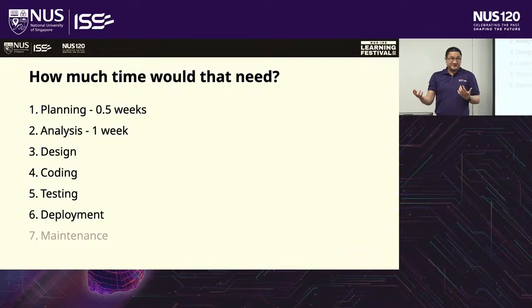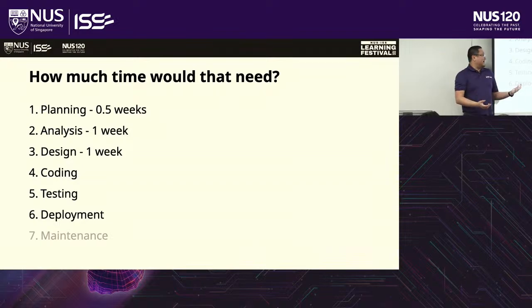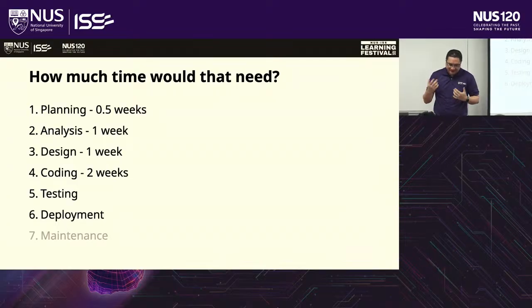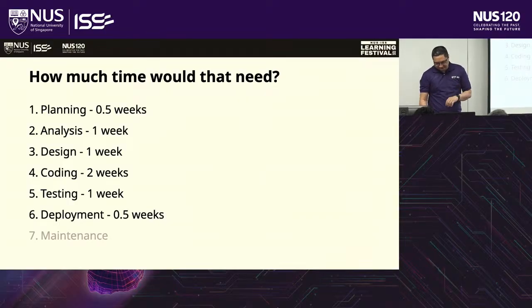Anyone think that's absurd? I don't think so, but it's a real life situation. And then design to come up with the tech specs and all that, another week. The actual work being done, 2 weeks. I think that's slow, but considering how much time that was planned to start the engine, that's acceptable, I think. Testing, 1 week, I think that's, yeah. And then deployment at half a week.